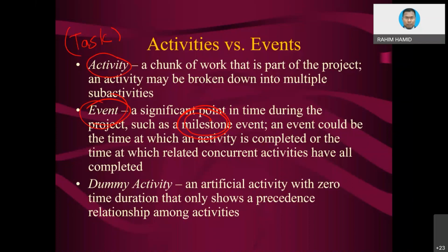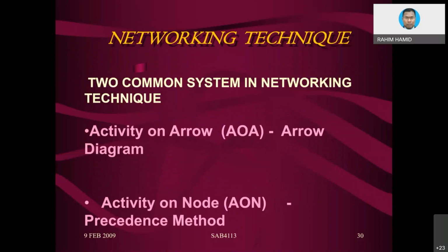Normally, the dummy activity appears in the AOA diagram. In AON and PDM diagrams, we do not need dummy activities. There is no need because the concept of the technique itself is basically self-sufficient. You have everything in order to construct the network diagram and let people understand. When people look at your network diagram, they understand, oh okay, this activity connects to that activity, and so on. That is the idea, to show it in graphic form. Okay, network technique. We do have AOA and AON diagrams.